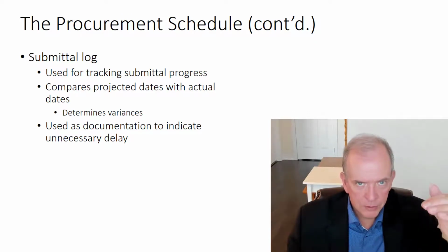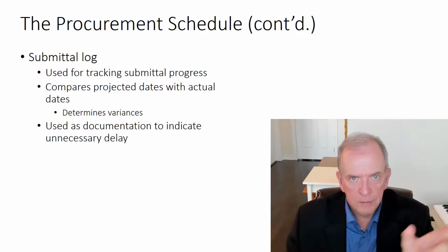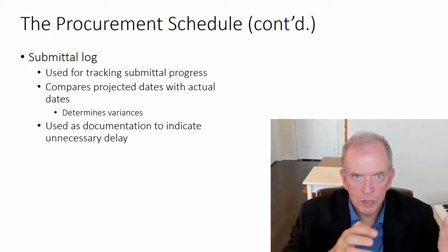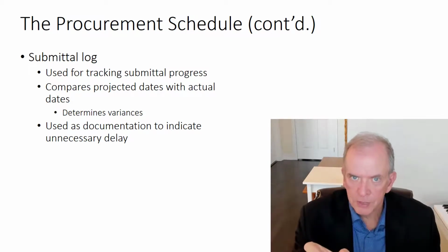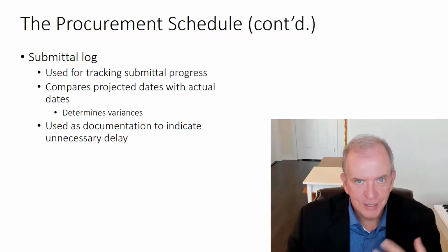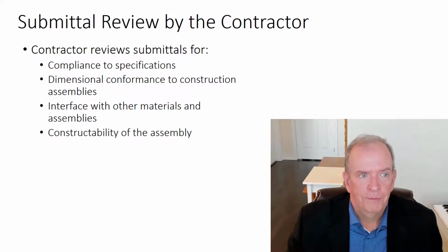We followed up. This is the list of emails we followed up. This was the date it was submitted. It took them 6 weeks to get back to us on this particular item. Sure, it had float in the schedule, and you show them the construction schedule, 4 weeks of float, but 2 weeks it ended up delaying us. That is very important information. That is the it depends in your favor. It depends, we discussed in the last lecture.